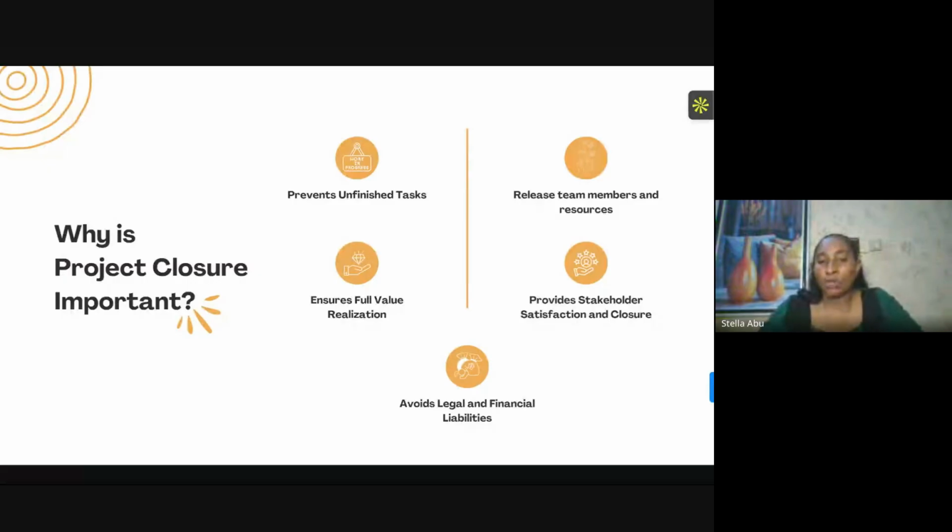Now, based on that, because there's something called project closure, every project must be formally closed. Every project. Whether that project is terminated or not, the normal closure is successful completion, right? The project has been completed, you meet your deliverables, your work is finished, normal closure. Premature closure, that's just the simple way to explain it, is like early termination. What it means is that something happens, either they change the budget or the market is changing,